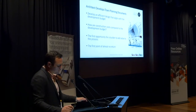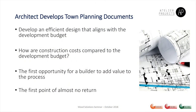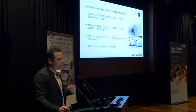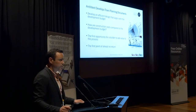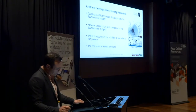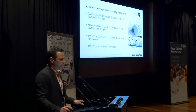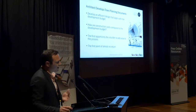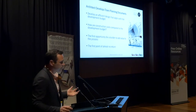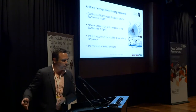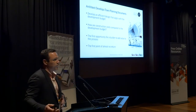It's a really important point. It's the first opportunity a builder has to actually contribute some value to the process as a consultant. Builders are the best people to tell you how much stuff costs when it comes to building. Getting a builder involved at this point is really critical and doesn't happen very often. And it's also the first point of almost no return — once you've lodged your town planning documents and they're approved, you don't really want to go back and change them. You really don't want to wait until the end of this process to realise you can't build it for the cost you wanted.